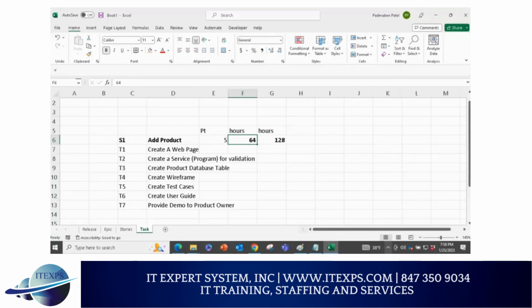That's why remember sprint planning is a long meeting, 8 hours for 1 month. Yes or no? And 4 hours for 2 weeks. That meeting is pretty aggressive, which means you have to continually work. When I see you are active, you see me active, because if you are not active, it's not going to be helpful. It's not going to work well.